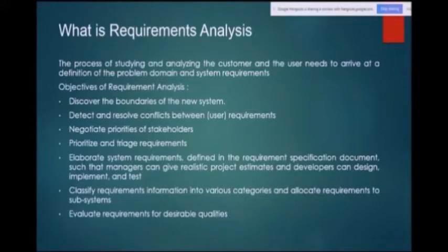So prioritize and triage the requirements. Then we have elaborate system requirements defined in the requirement specification document, such that managers can give realistic project estimates and developers can design, implement, and test. Our job is not designing, our job is not developing. Our job is to precisely, pinpointedly, in a very structured manner come out with a document after analyzing. So the prioritization and everything is to be done. So that is our job.